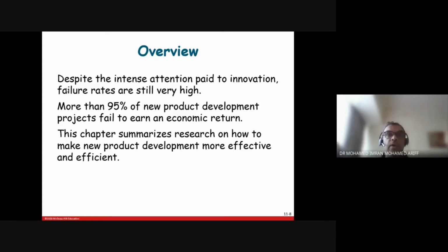And then you move on to the next branch. Let's say you have come to branch number 3. There is a problem, maybe something you did not see. It's okay, you have to rectify. And if that rectification needs you to come back to stage 1, then you come back to stage 1. So that's what we do in a stage gate process.